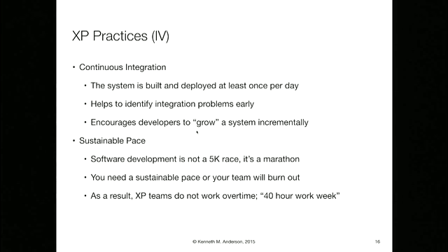And it encourages developers to grow a system incrementally. And it's important because Fred Brooks said, most projects, waterfall projects, are on track until they get to integration testing, right? And that's because they've just been delaying and delaying and delaying the inevitable, that the ambiguities in the requirements would finally manifest when we try to integrate. And so this says, no, integrate all the way up here. You have your requirements in design, you just built something, integrate, deploy, integrate, deploy. And do that every day until you get the system done.